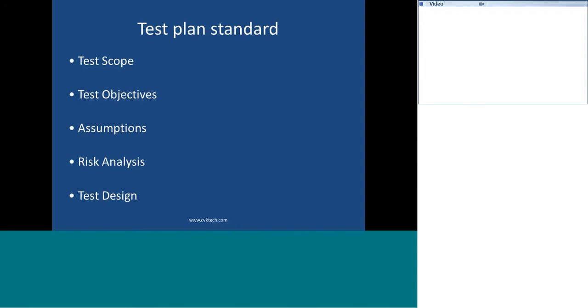Whenever we are going about a testing project, after the requirement analysis, all the team members should sit together and try to draft all the risks involved as part of testing this project. Some of the major risks will be the schedules, because testing teams will always end up having less time for testing. We have a dependency with the development team, and unless they deliver that particular product,